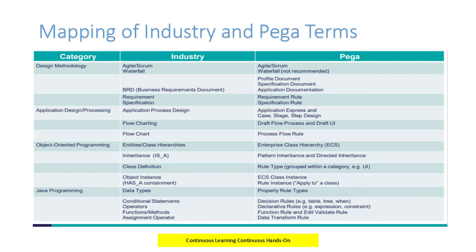Every sprint is usually 2 weeks, like 5 days, 5 days, and at the start of each sprint they will have sprint planning. At the end of the sprint they will have sprint retrospective meetings.